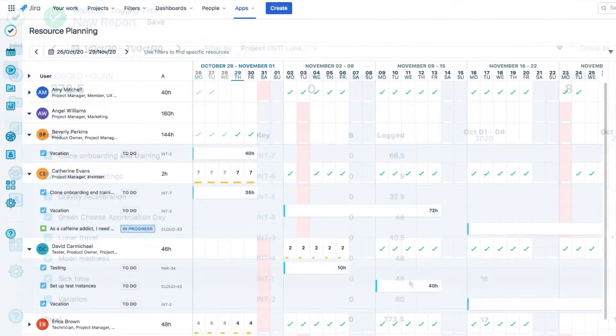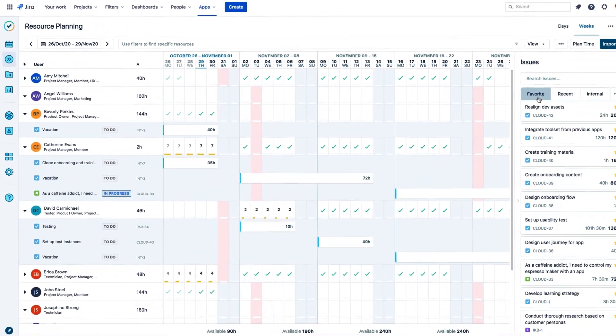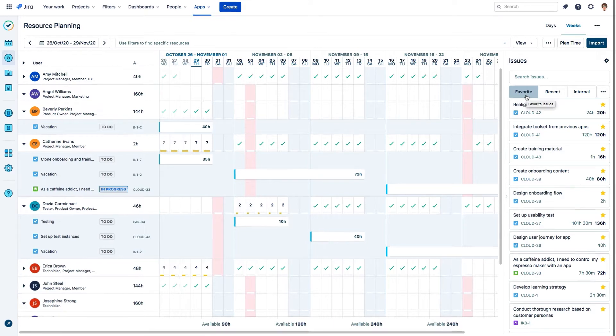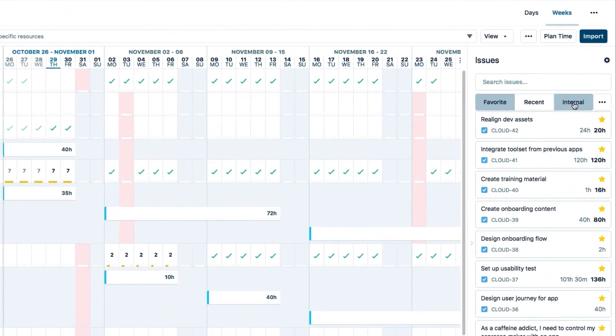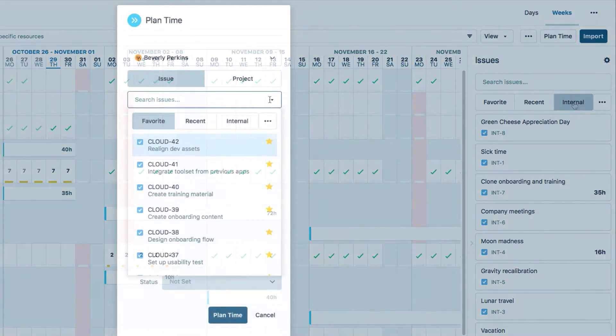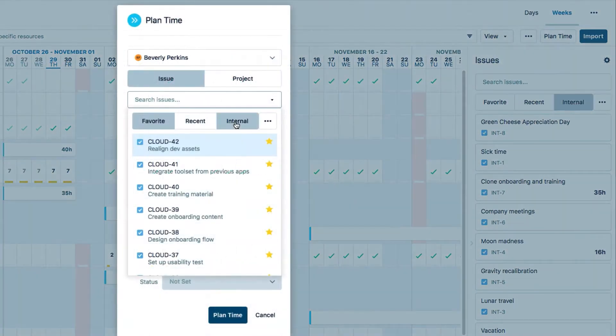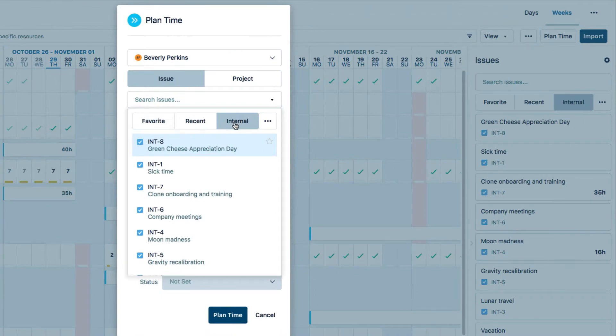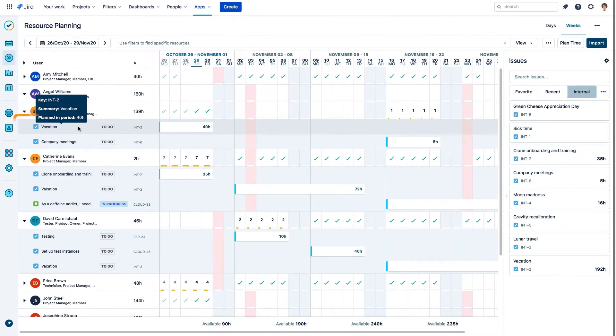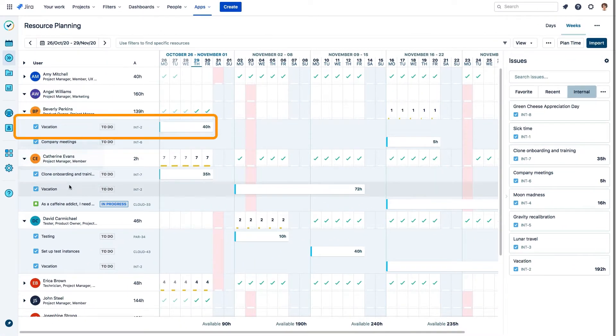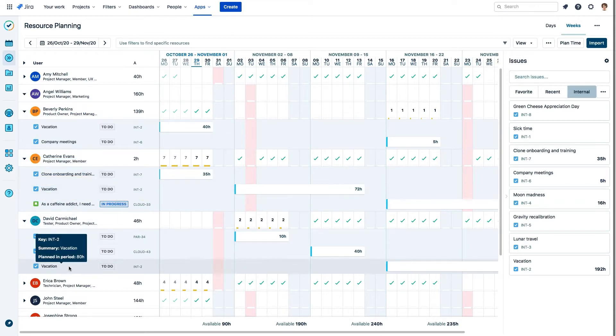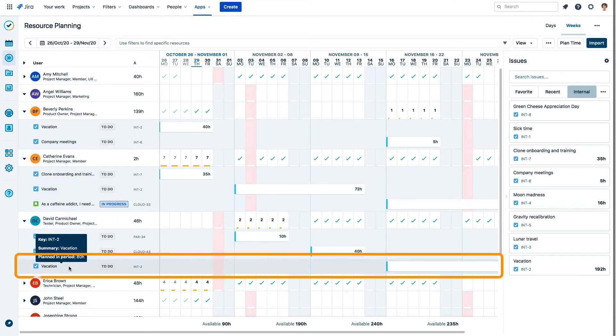In Tempo Planner, you can plan your vacations and personal time off. And as in Timesheets, you can easily find internal issues in the Issues side panel and in the Plan Time form. And having time off planned out helps managers plan ahead for projects because they can see their team's capacity for work.